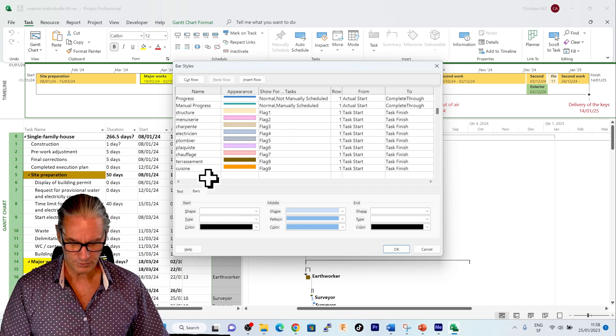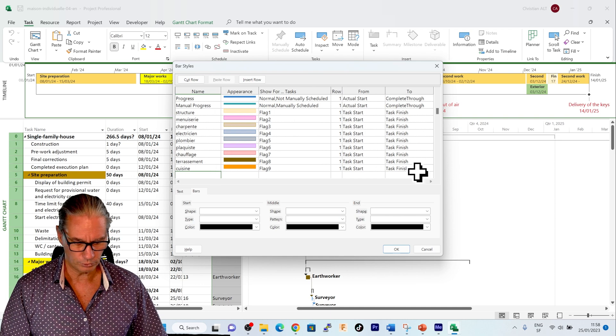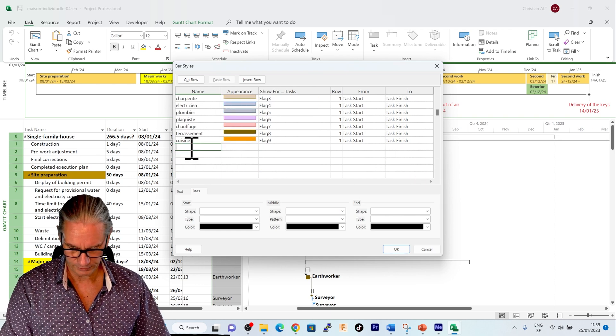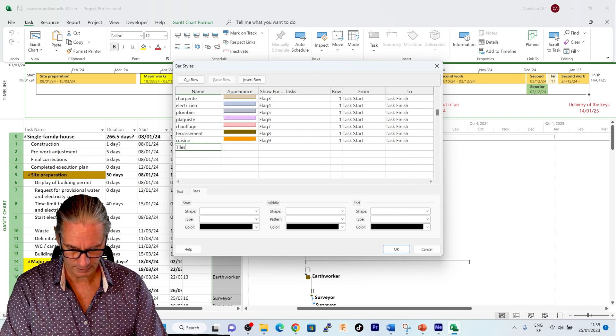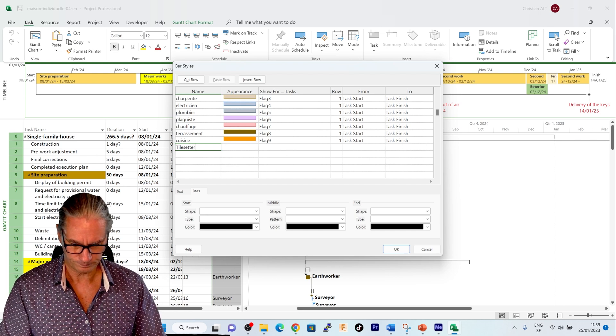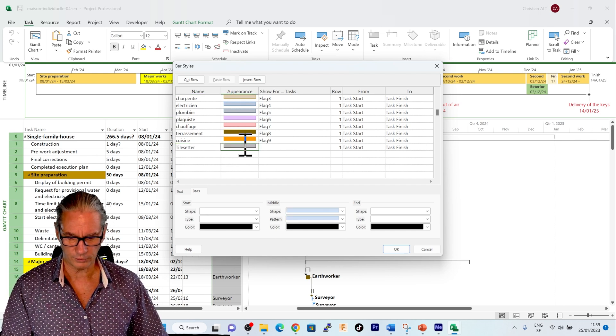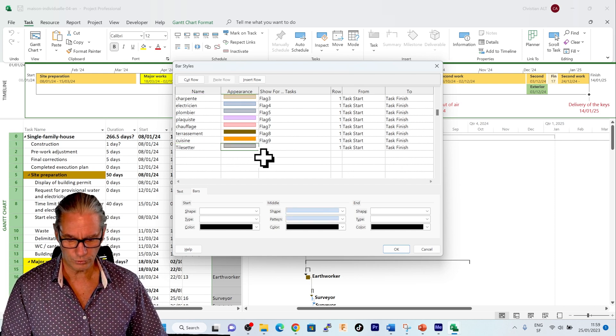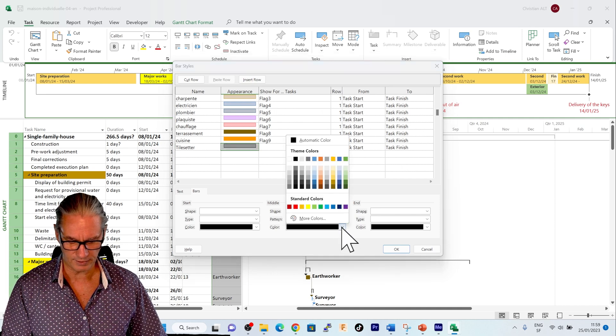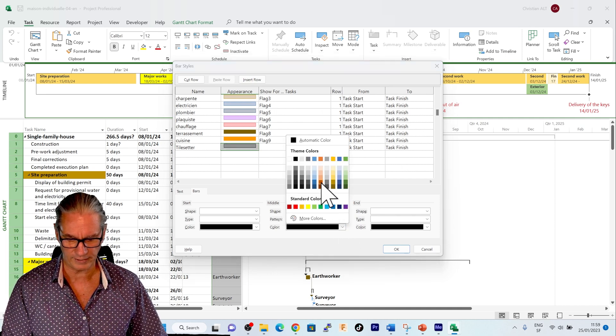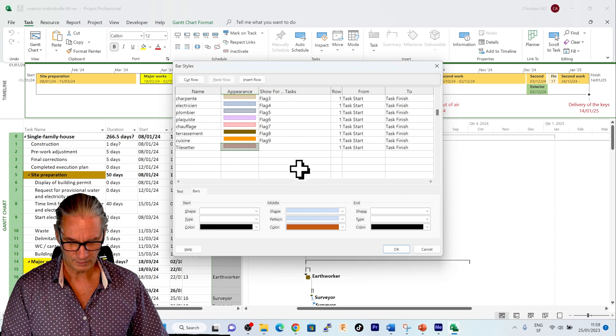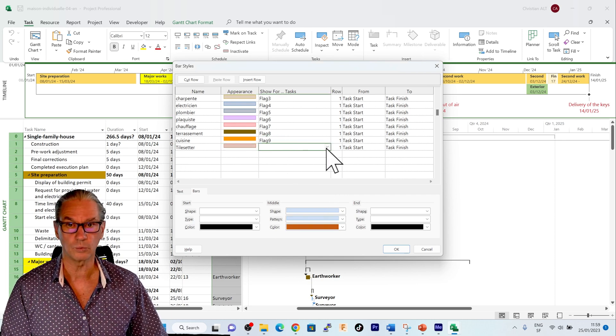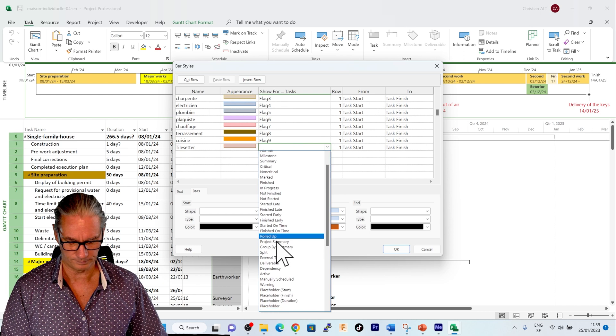So what I will do here, I will here define tile setter. The color that I will choose here down is a brown color like tiles. And I will associate this with the flag 10.